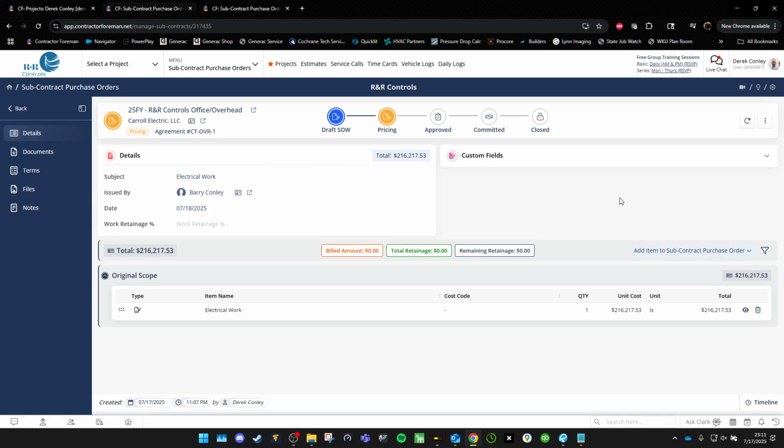Or let's say we do a project and anticipate self-performing, but then when we get to it, we're like, this contractor here, we're going to see if they can give us a price. Maybe their price will be cheaper than us self-performing. We've done that sometimes on controls projects with thermostat stub-ups. Subcontract the electrical. Since they're already running all this conduit, just throw us some thermostat stub-ups, and it ends up costing less money.